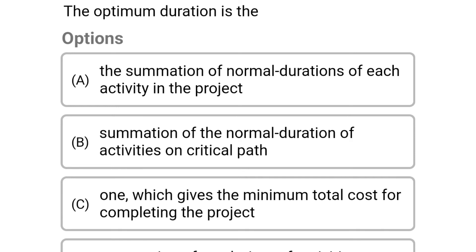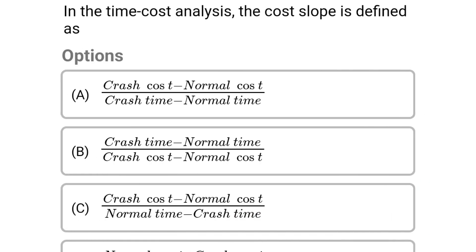Next question: the optimum duration is — option A: the summation of normal duration of each activity in the project, option B: summation of normal duration of activities on the critical path, option C: the one which gives the minimum total cost for completing the project, option D: summation of crash time of activities in the critical path. The correct answer is option C: the one which gives the minimum total cost for completing the project.